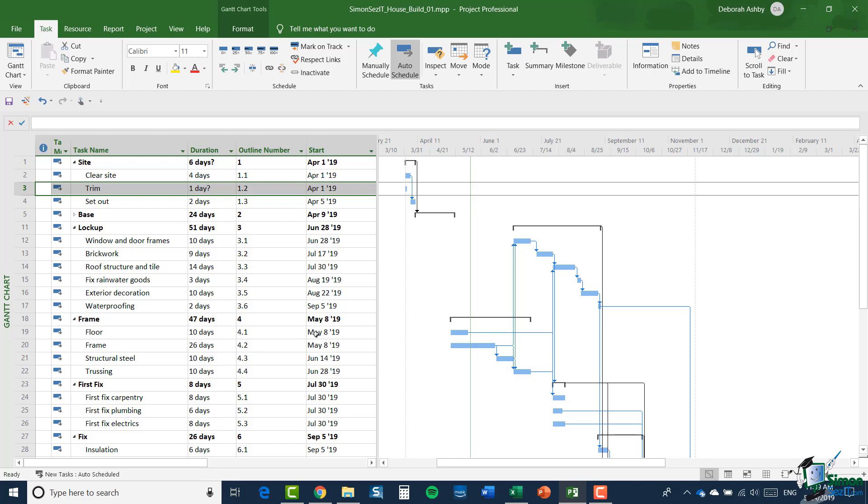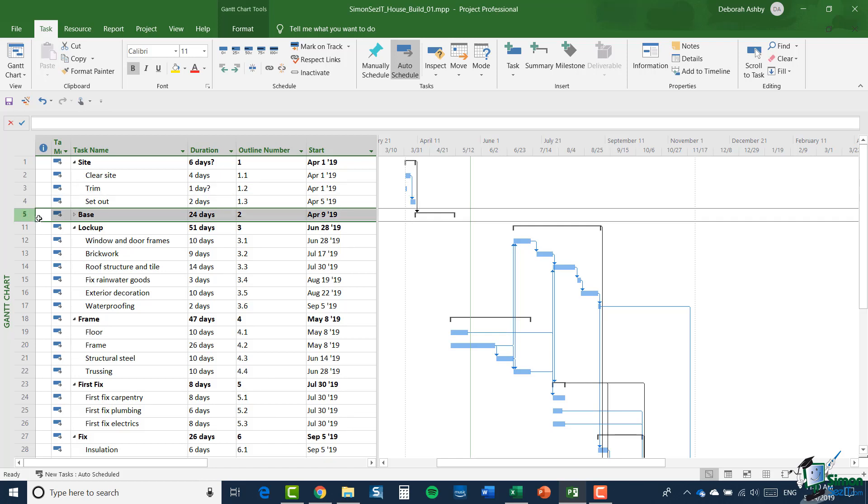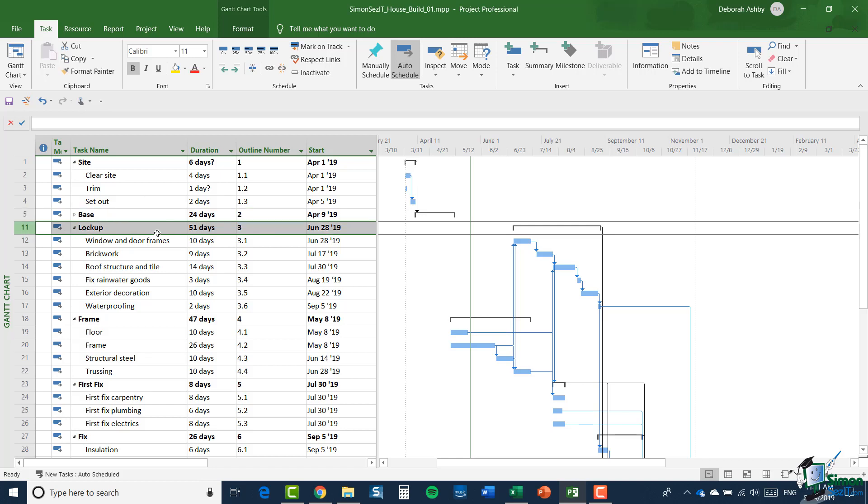It started out with the outline number of 1.2 and it now has an outline number of 1.3. So you can see that as you change the structure, particularly if you insert or delete tasks, then outline numbers potentially can change. For example, if I inserted a new summary task between base which has an outline number of 2 and lockup which has an outline number of 3, that summary task would get outline number 3 and everything from lockup onwards would have its outline number changed. So lockup would become 4 and so on. So although outline numbers work and Project 2019 looks after them for you, they are very prone to change if you either introduce tasks into a project or remove tasks from a project, or indeed if you just move the tasks around.